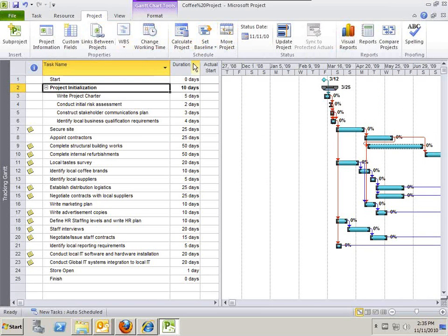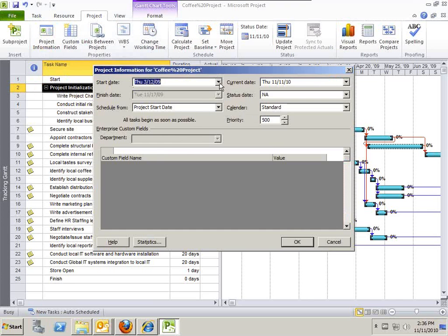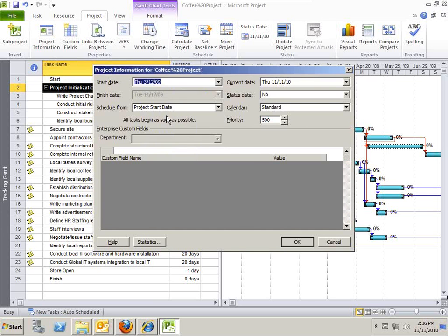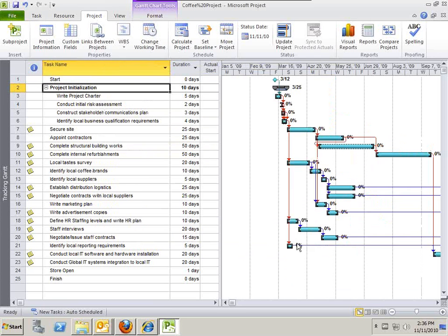It now has the ribbon interface, which I really like, and it has a couple of new features, which I'll talk about. But as part of the process, as I open this template, one of the first things I should do is update the project schedule. So for this project, opening the coffee shop in Fiji, I know we're going to start doing work on January 4th, 2011. Okay? So as soon as I do that, I'm going to hit OK. Notice that the schedule did not change yet.